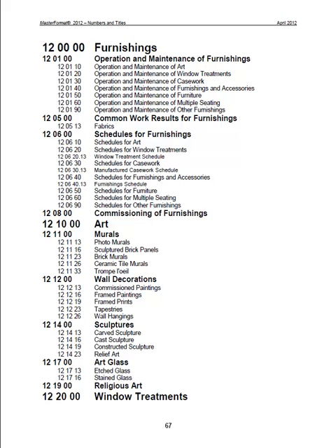We have a lot of work that's done on campus here that falls under the percent for art rules that require us to put a certain percentage of our total project cost into artwork for the building. Generally there's maybe 1 or 2% set aside for an artist from the area that's been approved by the state to do a commissioned piece of artwork for our buildings, and we see that in several locations on campus.